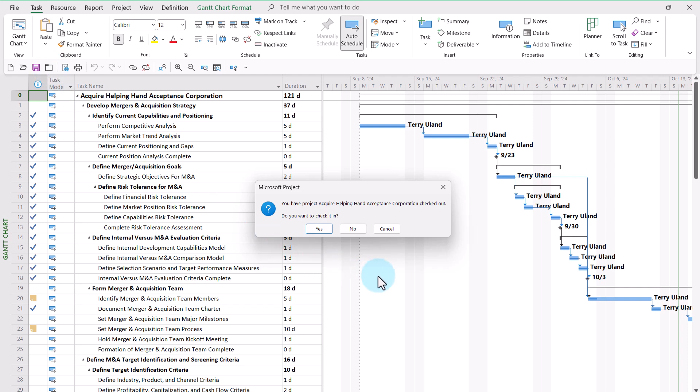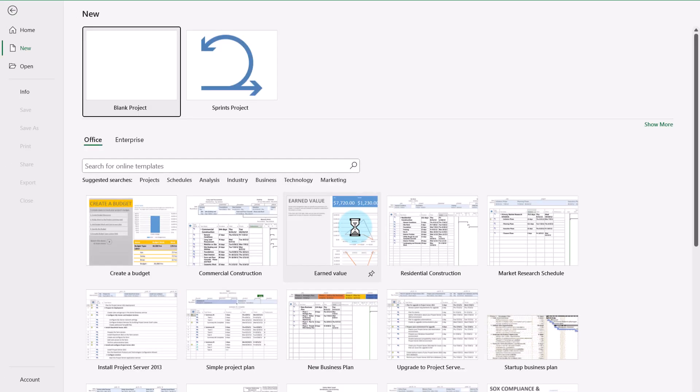But in the confirmation dialog to check it in, instead of clicking the default yes button, I need to click the no button to leave the project checked out so that no one can edit it while I'm away working with it in offline mode.